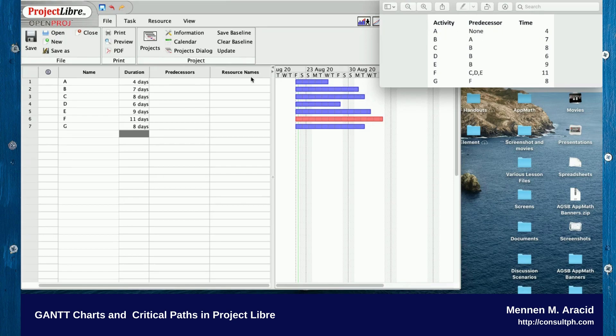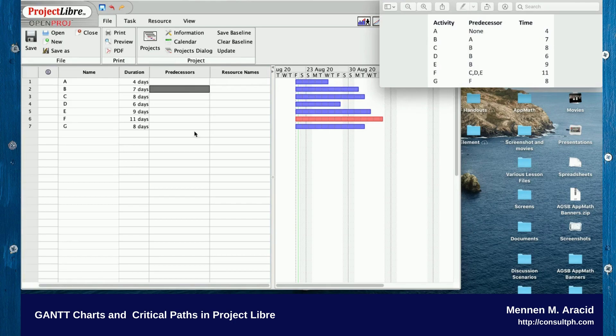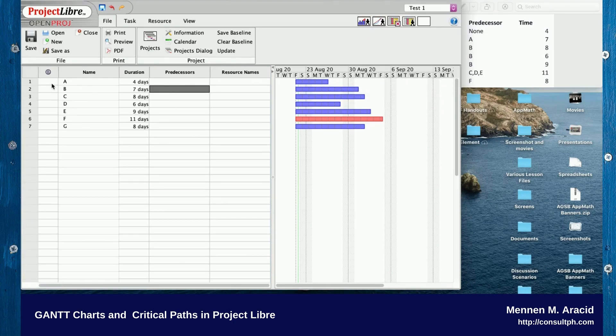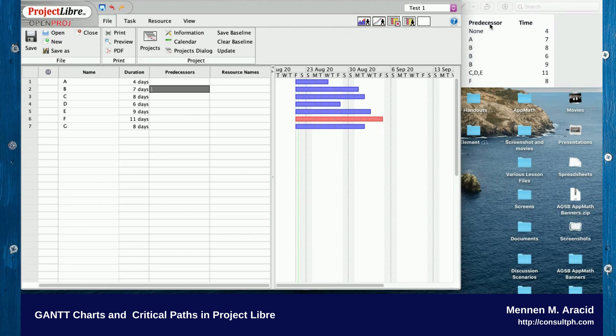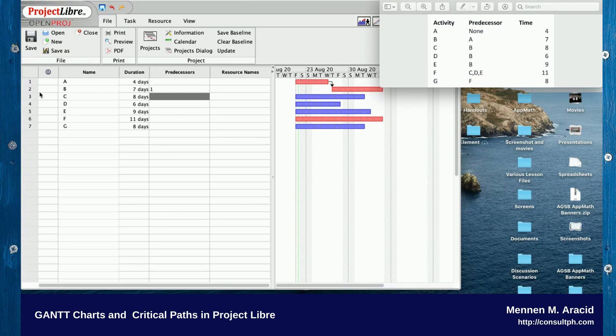Activity B's predecessor is A, but in Project Libre you have to encode it as line numbers. Since the predecessor for B is A, you enter line one. For C, D, and E, the predecessor is B, so that's line two.